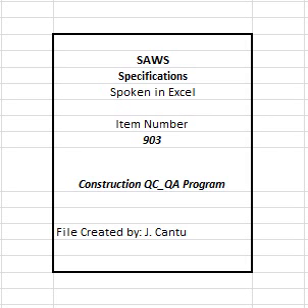D. Contractor coordination with other agencies. 1. Identify all agencies and a contact person from each agency, as appropriate, including but not limited to, City of San Antonio Departments, Bexar County Departments, Texas Department of Transportation, Texas Commission on Environmental Quality, San Antonio Water System, etc. 2. Identify all existing utilities/field conditions as appropriate, including but not limited to, SAWS, CPS Energy, AT&T Telephone, Time Warner Cable, etc.